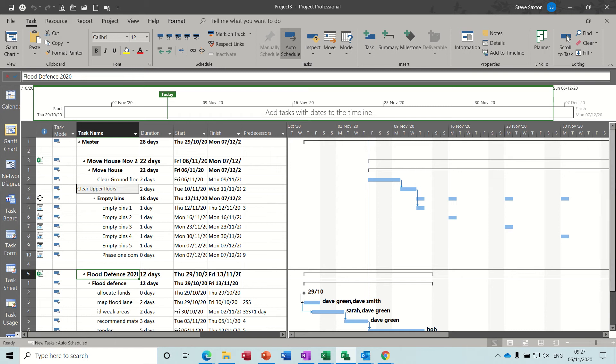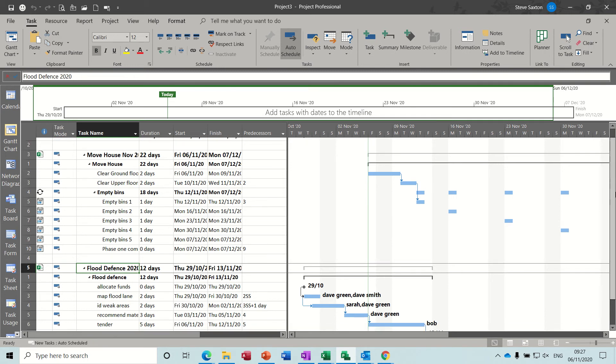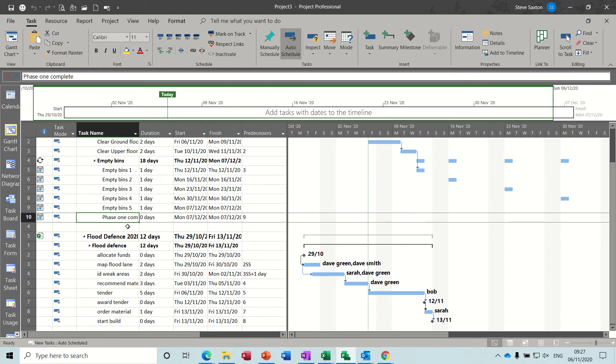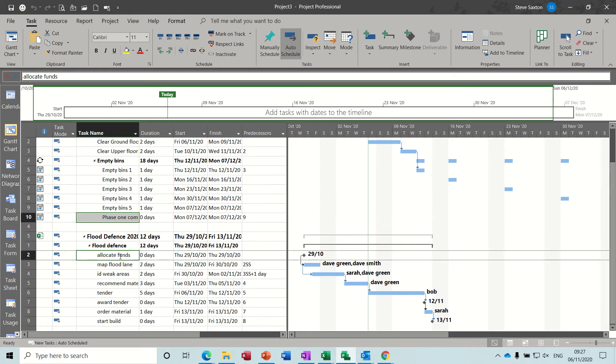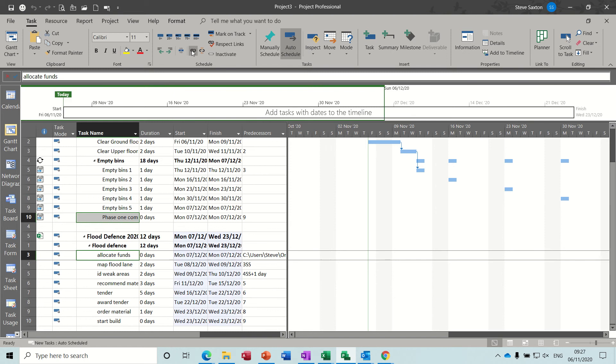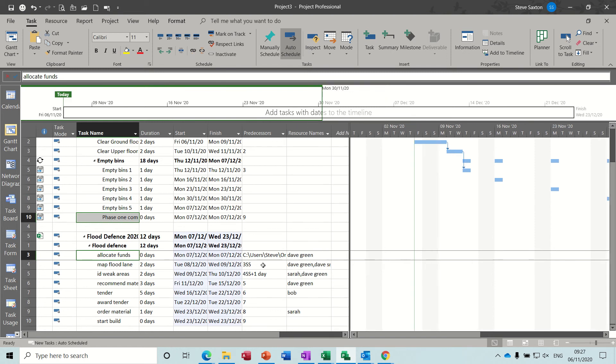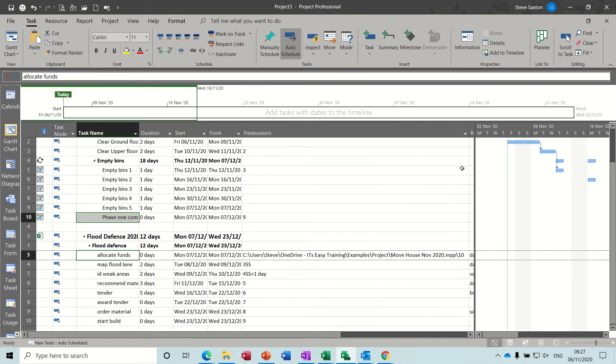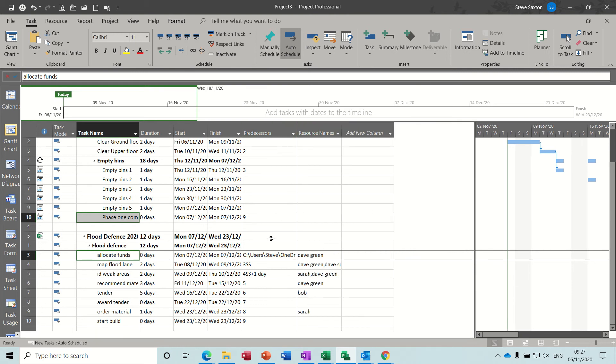Now if you want to link files like this in a master file, you can do, between projects this is, so if I click on that and then hold my control key down and click on allocate funds and then click the chain link, you can see there's a link there now with the file path. That one there is a file path. It's telling me where that is and it's linked it and the whole project has moved to the end of the first project.